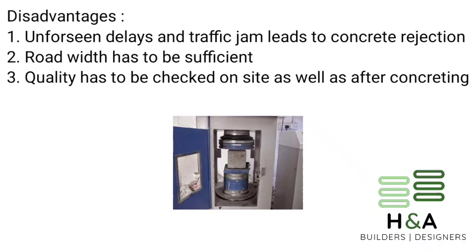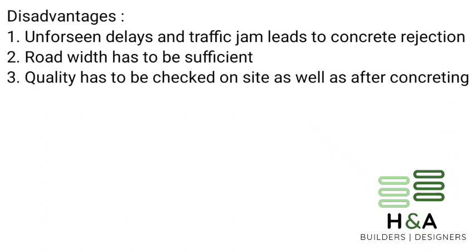Even I have heard this from many of my customers. And next point is that the last RMC vehicle should be ordered after taking accurate measurements, due to differences between drawing and site measurement. I have used concrete from batching plants and RMC for more than 4 years. I am very satisfied with RMC compared to hand mixed concrete, but the customer may not get complete satisfaction because of lack of site testing facilities for residential projects.